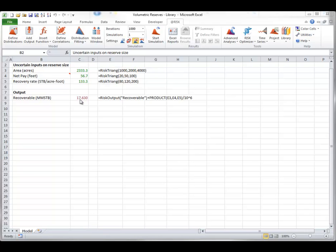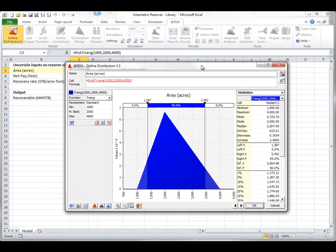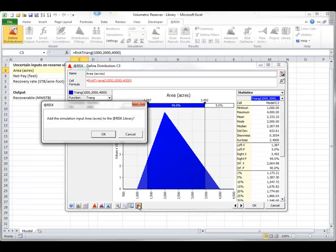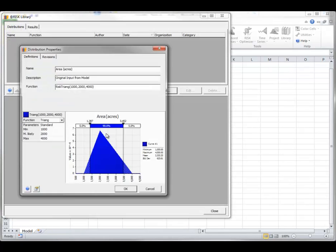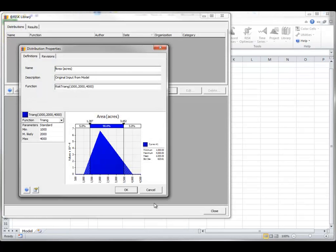You can imagine that these input distributions are the result of much research and expert opinions, making them reusable for similar simulation models — so it makes sense to store them in a database. To add an input distribution to the library, select one of the input cells and click the Define Distributions button on the At-Risk ribbon. You can edit the information such as the name, then click the Add Input to Library button. At-Risk opens the At-Risk Library window displaying the input about to be added, including a Revisions tab for storing information about revisions to distributions. Click OK to confirm.